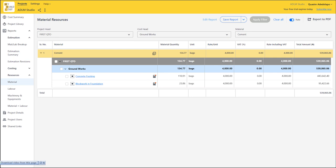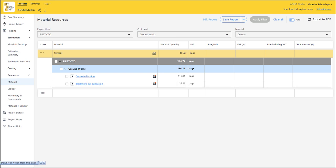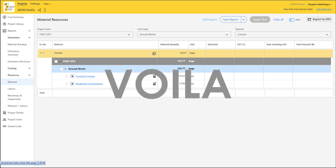Another major feature is the rate toggle. You can turn the rate off, so if you just want to prepare your own price bill or purchase order, just send this to the subcontractor once you turn the rate off, export to PDF, and voila.